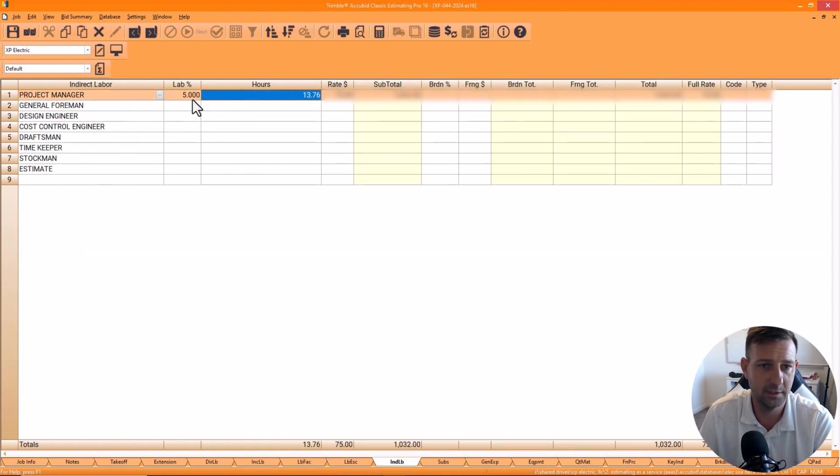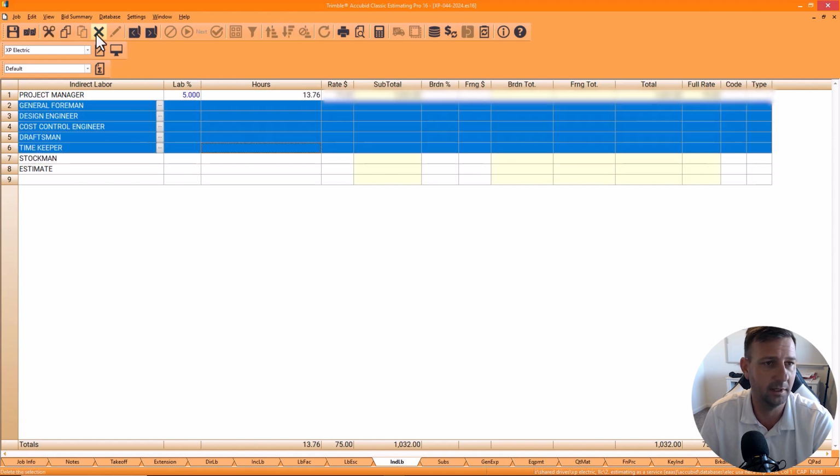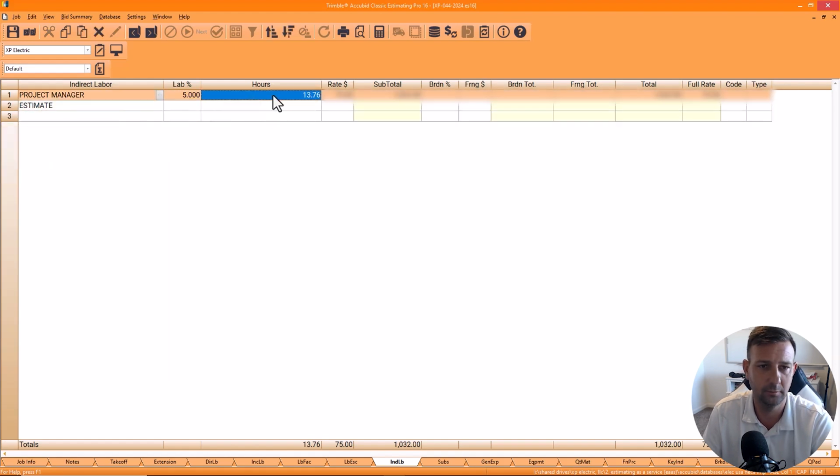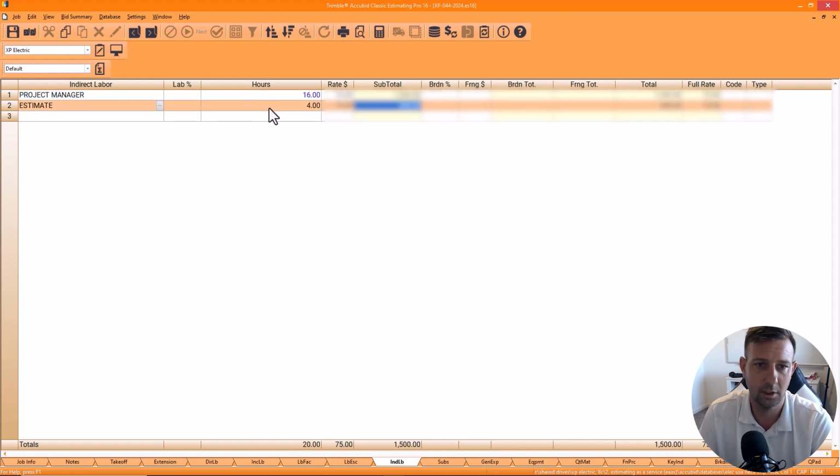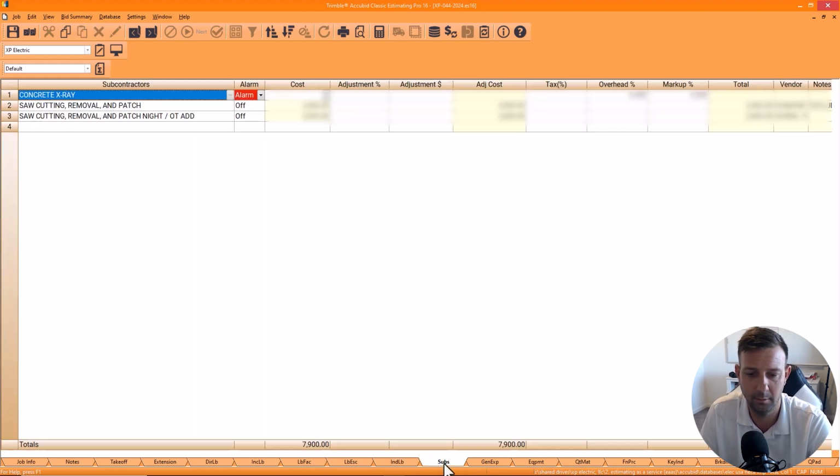I'll include 5% of the job. I'll allocate 5% of the job to project manager and then look at it and then maybe adjust it to like 2 days. I'd also charge them for the estimate. Why not? Try to put it in there because they seem desperate.